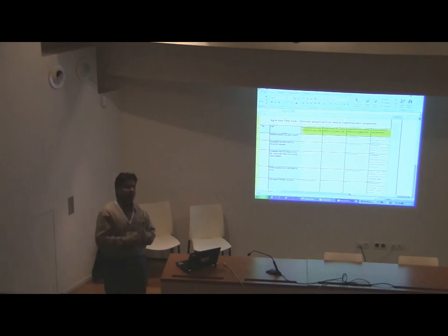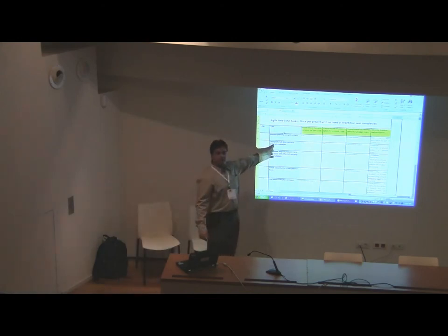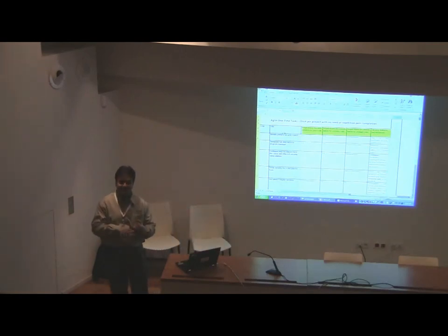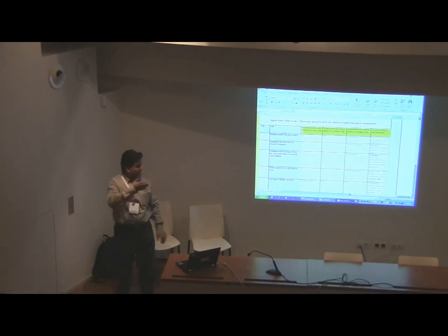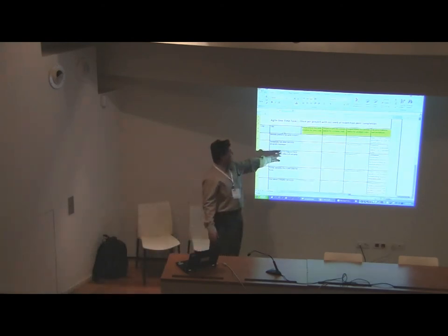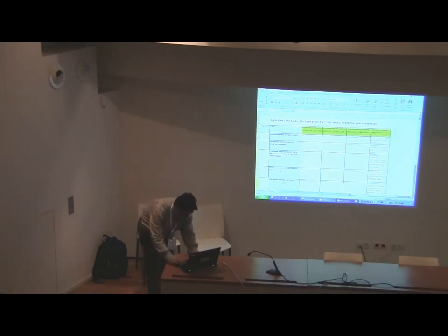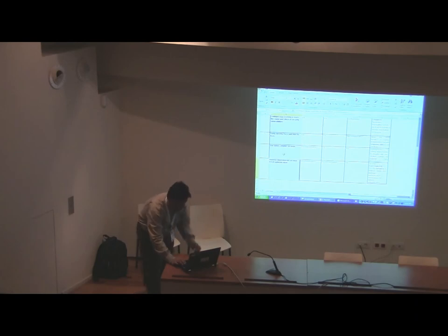typically at the beginning. The only thing is that this is the category which allows for a little bit of lag time, which is, let's say if I look at this second one, right? You designate a full-time security program manager. Maybe finding one or identifying one with the right set of skills is not something that you can do in one day, right? So you get a little bit of lag time, but you need to do it. So typically most of them are supposed to be done at the beginning itself, right? Or for this matter, let's say configure bug tracking to track the cause and effect. So once you have that flag on, or once you have this mechanism, you're done, right? Okay.